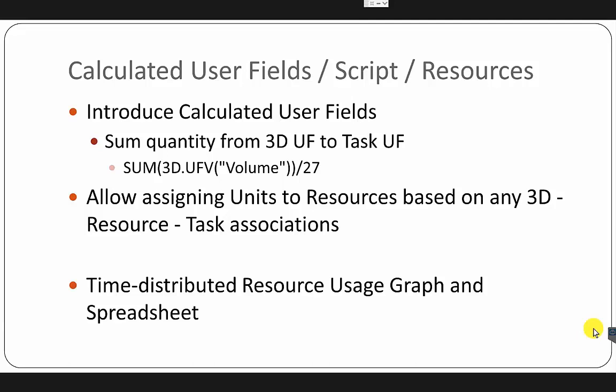which is to transfer the quantity parameter, in my case, for concrete. So it's a transfer of volume from 3D objects to a task user field that I am going to create in Synchro. The second step I want to talk about is that you can also assign resource units to resources based on any 3D resource task associations. That is to say, in the past, you may have experienced troubles getting the quantities from estimating. You may have